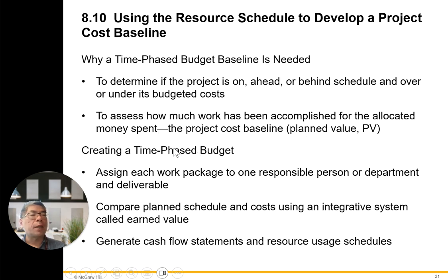Creating a time-phased budget basically means assigning each work package to one responsible person and department and deliverable. Compare plan, schedule, and cost using an integrated system called earned value, as well as generate the cash flow and resources of each schedule.